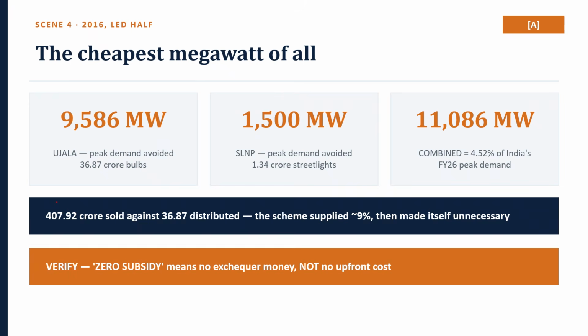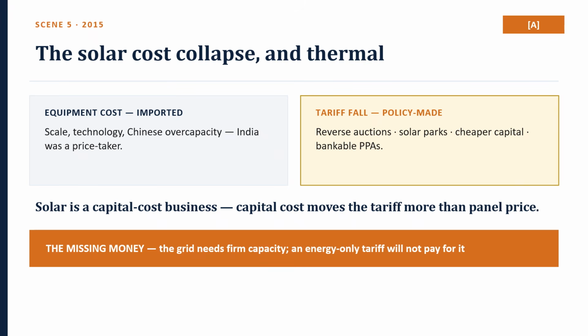Keep the two parts and SLNP's business model in one line: EESL bears the entire upfront cost of the street lights and recoups it through monthly or quarterly annuities paid by the municipality while maintaining them at over 95% uptime. The municipality contributes no capital. The annuity is paid out of the saving. That is an ESCO model, a fourth financing route alongside EPC, BOT, and HAM. And it is a counter-example that proves chapter 10b's smart city diagnosis. It worked precisely because it required no municipal capital and no municipal capability.